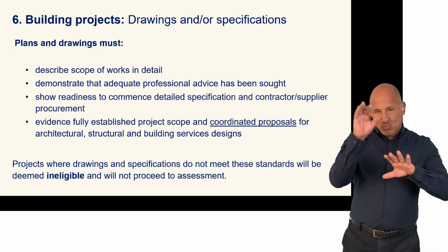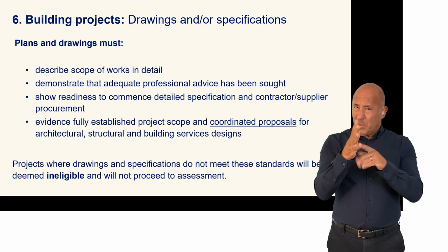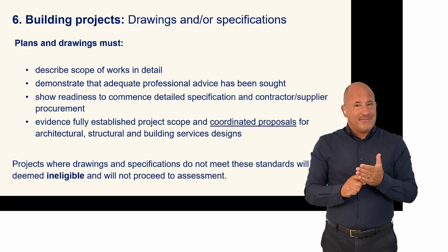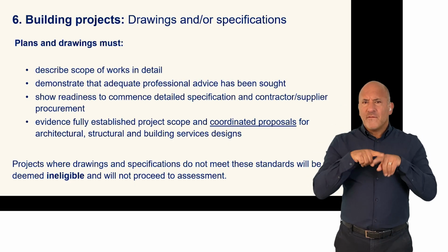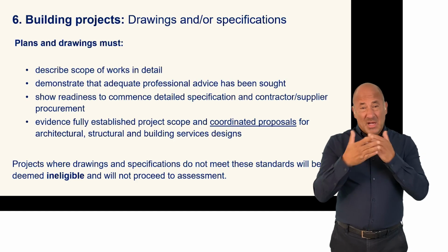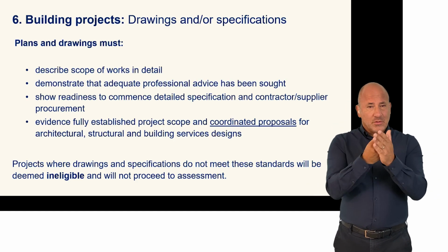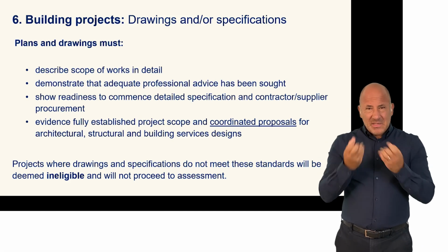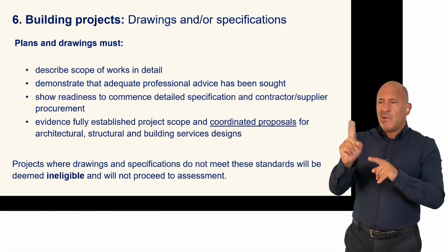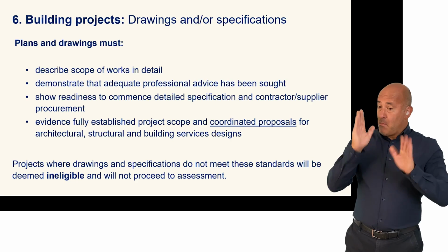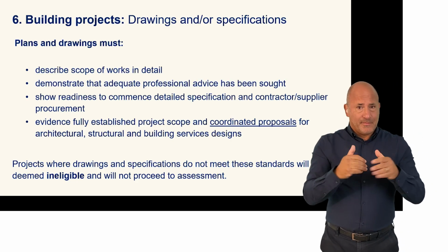Drawings and/or specifications are critical to making a strong application for a building project, and the following applies even if you're not following the REBA plan of work. Relevant drawings and/or specifications accompanied by a cost plan or detailed expenditure document prepared by a suitably qualified professional must be included as mandatory attachments to the full application.